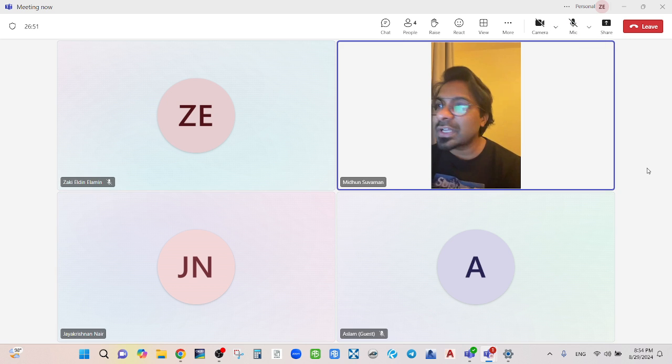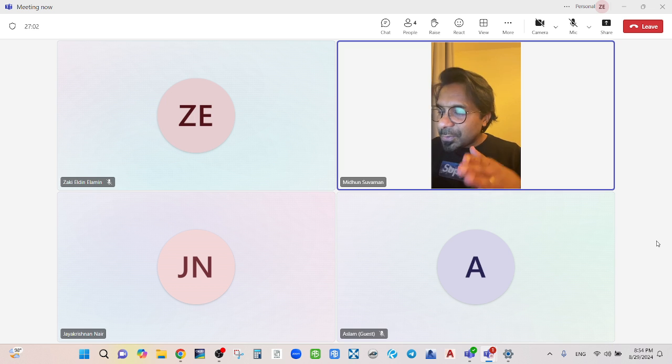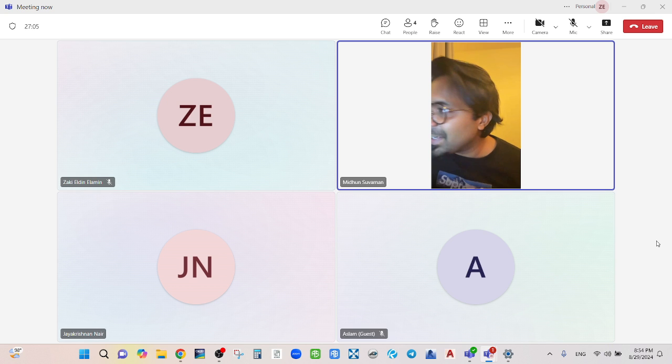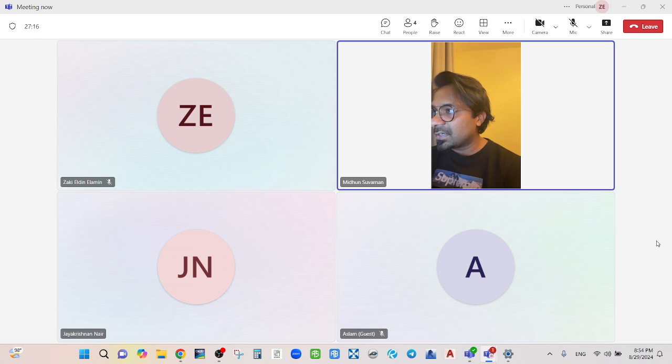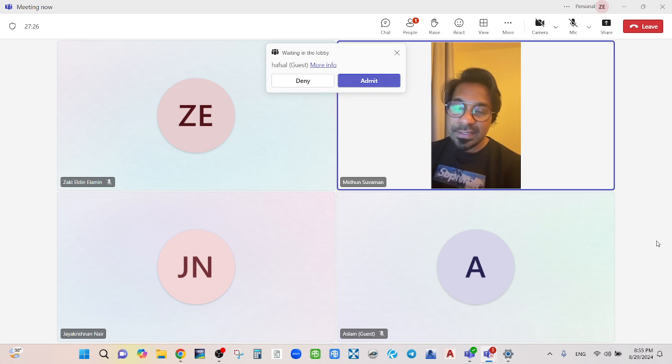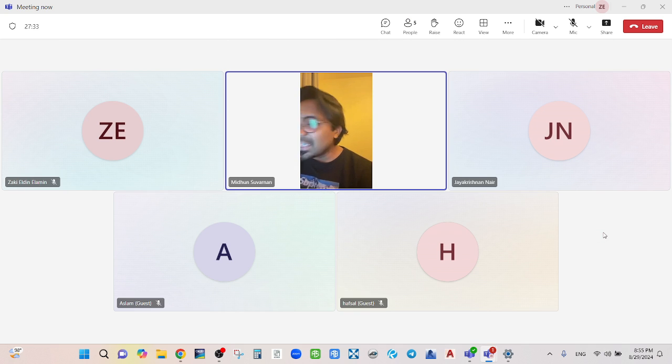Sorry. There are two types of guarantee, right? Conditional guarantee and unconditional guarantee. When I say guarantee, imagine a piece of A4 paper with a bank letterhead, not a check. Basically, there are two types: conditional guarantee and unconditional guarantee. Conditional guarantee means the employer has to prove the default; he has to prove this contractor is not performing. But in the case of an unconditional guarantee, the employer doesn't need to prove the contractor is in default. That is the first case.